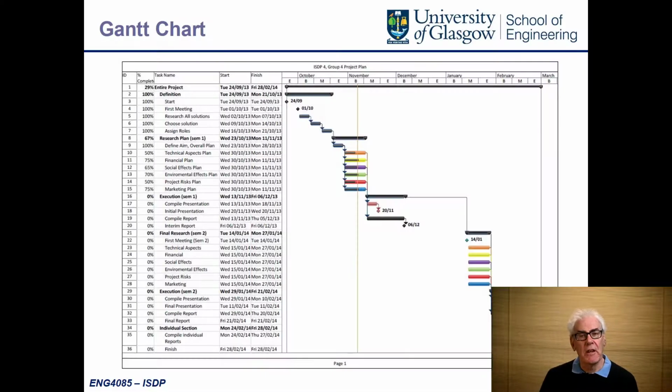We've all seen a Gantt chart like this. Every project produces a Gantt chart. Every Gantt chart looks like this. Every time I see one like this, it's always wrong. The reason that it's so wrong is it does a beautiful waterfall from the left-hand side down to the right-hand side, and everything ends at the right time. There's very little interlinkage between them, and that's when problems start with projects. By all means, prepare a Gantt chart, but look carefully at what you can do in parallel in the Gantt chart. Arranging a project serially just means you're probably wasting time during the build of the project to deliver the end goal.